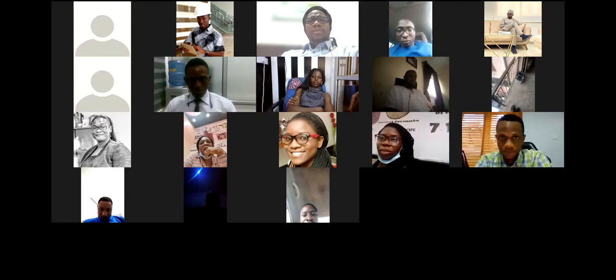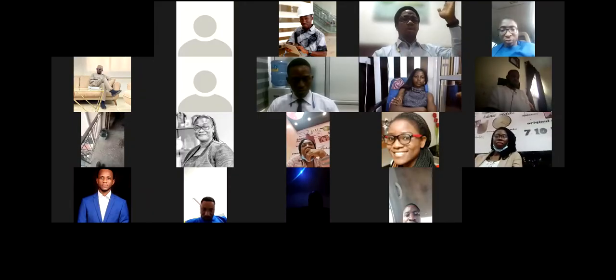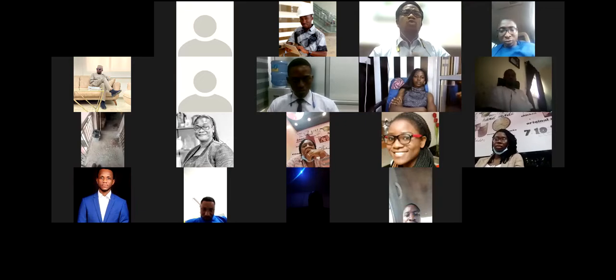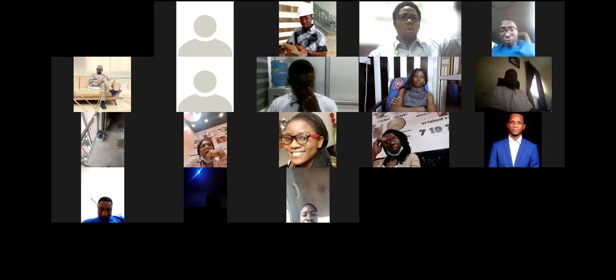Joseph, did you get that? Please, I didn't get that, my network is bad. Sorry, sir, can you take us back here again? Yes. You have a column where you are recording the costs of fixing the defects that are observed. You should also know what it will cost to replace the entire machine, asset or system if you don't want to repair it. Just divide the numerator, the repair cost, by the denominator, the replacement cost. That ratio is your FCI.